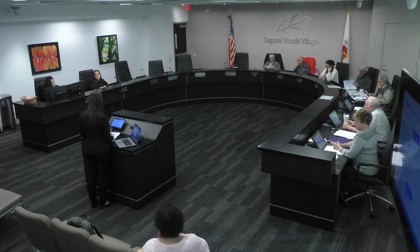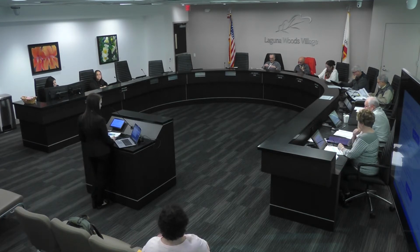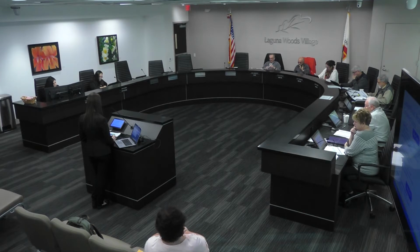As you know, a lot of facilities have a central charging area, if that's the way United wants to go, or we could just identify carports and say this is where the charging facilities go. That will be determined in Task 2. But for right now in Task 1, we looked at a couple of carports and then extrapolated the cost to all of them just to get a rough order of magnitude.